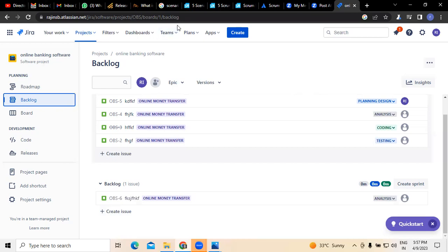Right. So in order to reduce that complexity, you are slicing that into 4 different parts: user interface designing, database designing as separate, coding as separate, testing as separate. This is how generally 4 tasks are divided. Agree? Yes, sir. Right. We have divided it into 4 different tasks. So those tasks can be there in the backlog. Apart from user stories, you can add tasks even.